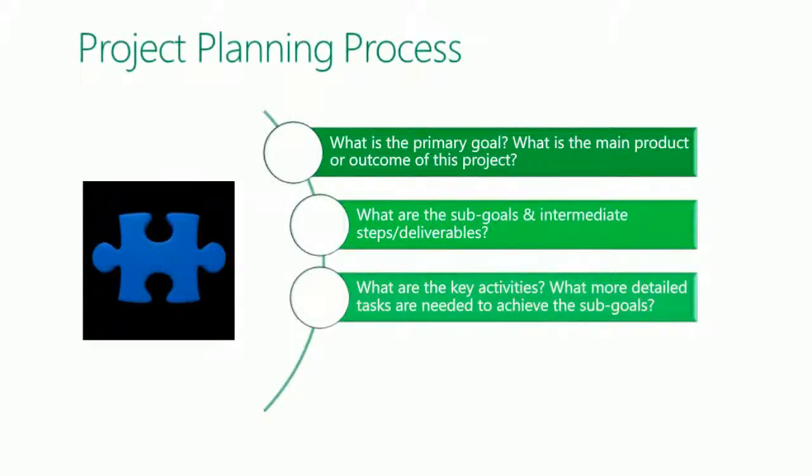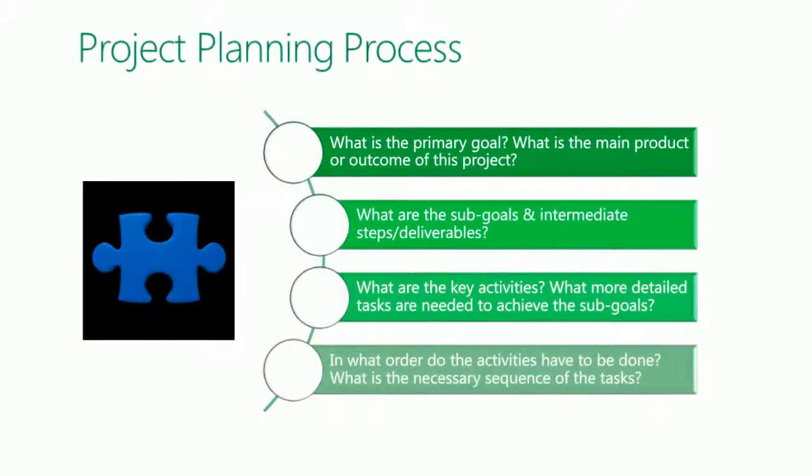So how do we get even another layer down? Microsoft Project will let you indent, which I'll demonstrate, and I'm just using sort of 3 examples here: the organizing principle, or the phases, the major activities, and the tasks. We can go deeper and deeper into that granularity in terms of breaking down the work into packets that are digestible by the team that are working on the tasks.